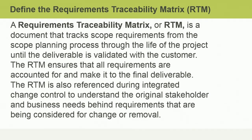A requirements traceability matrix or RTM is a document that tracks scope requirements from the scope planning process through the life of the project until the deliverable is validated with the customer. The RTM ensures that all requirements are accounted for and make it to the final deliverable. The RTM is also referenced during integrated change control to understand the original stakeholder and business needs behind requirements which are being considered for change or removal.